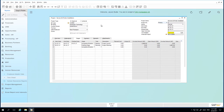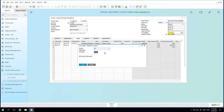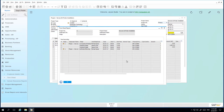Under the project window and under the Stages tab, we are now going to view the timesheet report via the context menu. We simply right-click and open up the timesheet report. We have the ability to select a specific sub-project or stage that we would like to review — the timesheets that have been assigned against these sub-projects or stages. From here we can see the link between the project stages and the recorded times billable by the relevant employees.